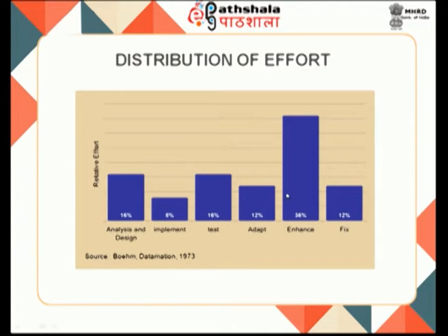So if you try to understand from this figure, only 8% of the overall effort is being given towards implementation, whereas the other independent activities take the major concentration. Assume having taken up a project, 16% of the time will be spent towards analysis and design alone. An equal 16% of time will be spent towards testing. 12% will be spent towards adaptation. 36% will be spent towards enhancing the same software.